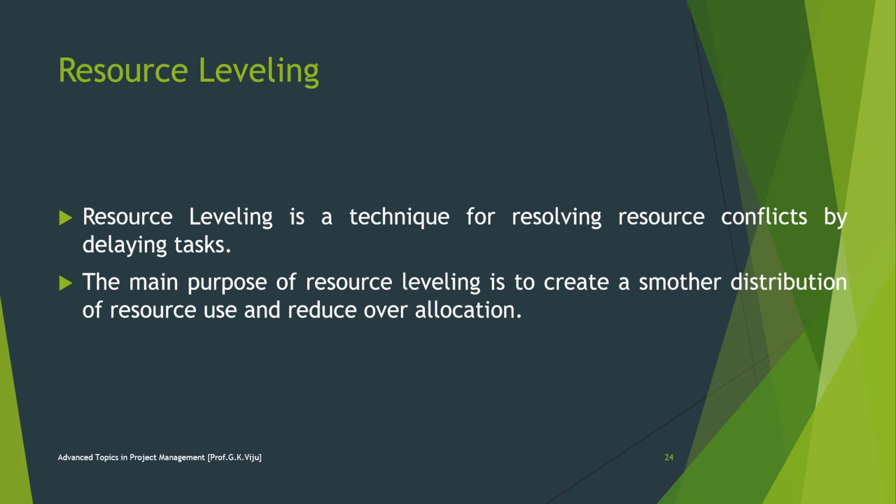So how can we avoid this? We can do it by resource leveling. It is generally used to examine the unbalanced use of resources, usually people or equipment, over time for resolving over allocation or conflicts. When performing the project planning activities, the manager will attempt to schedule certain tasks simultaneously. When more resources such as machines or people are needed than are available, or perhaps a specific person is needed in both tasks, the task will have to be rescheduled sequentially to manage the constraints.